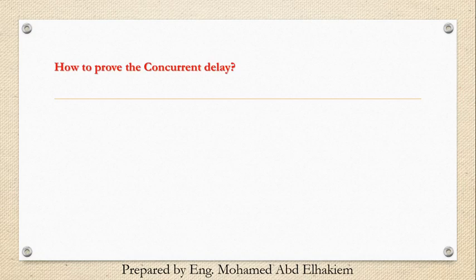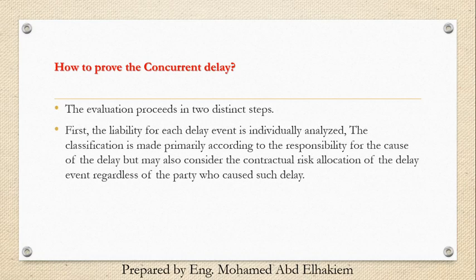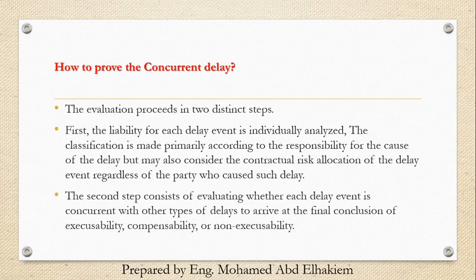How to prove the concurrent delays? The evaluation proceeds in two distinct steps. First, the liability for each delay event is individually analyzed. The classification is made primarily according to the responsibility for the cause of the delay but may also consider the contractual risk allocation of the delay event regardless of the party who caused such delay. The second step consists of evaluating whether each delay event is concurrent with other types of delays to arrive at the final conclusion of excusability, compensability, or non-excusability.